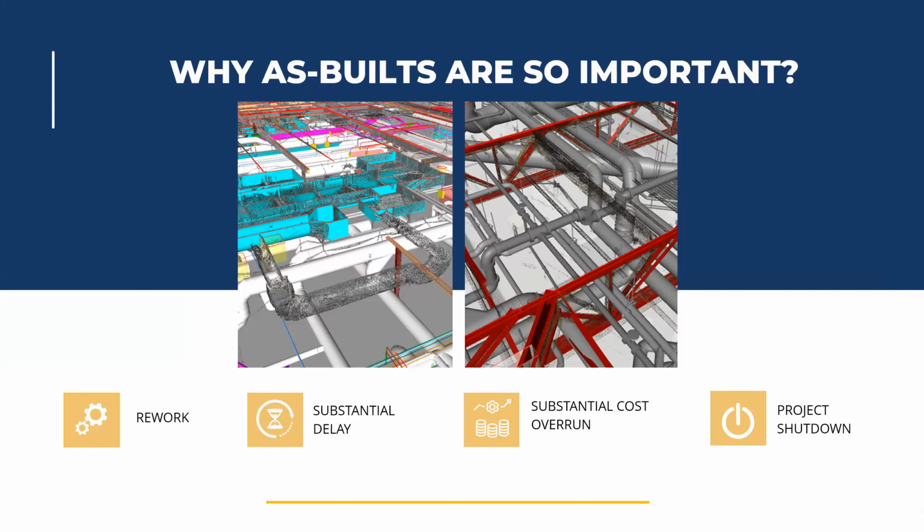We had one build-out project. We had coordinated three quarters of the scope and got into installation in the field. Then what we found out was that the new design didn't fit. What happened was the structure model didn't match the structure in reality. The columns and the beams in the model were not even close to what's in the field.